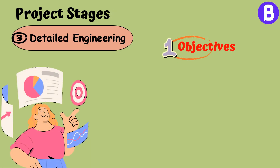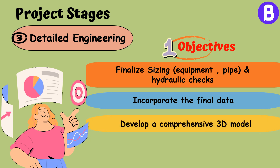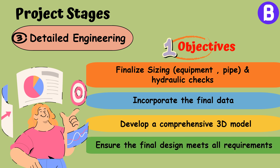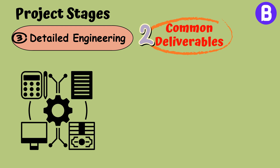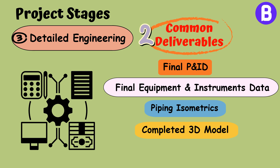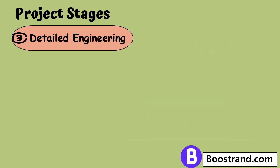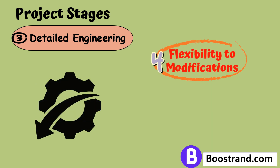The aims of the detailed engineering stage include finalizing equipment and pipe sizing along with hydraulic checks, incorporating final data from vendors, developing a comprehensive 3D model of the plant, and ensuring that the final design meets all technical, safety, and regulatory requirements. Deliverables include the final P&ID, final equipment and instrument data verified by vendors, piping isometrics, completed 3D model, and detailed construction schedule. The accuracy of this phase is around plus or minus 0 to 10 percent of the estimated budget depending on which sub-phase we are in, so flexibility to modifications is low.